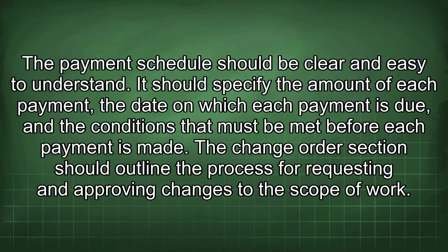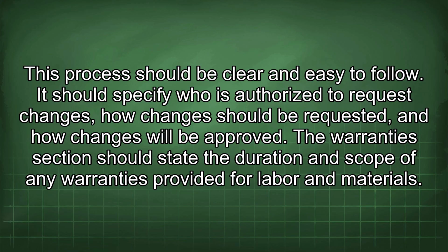The change order section should outline the process for requesting and approving changes to the scope of work. This process should be clear and easy to follow. It should specify who is authorized to request changes, how changes should be requested, and how changes will be approved.